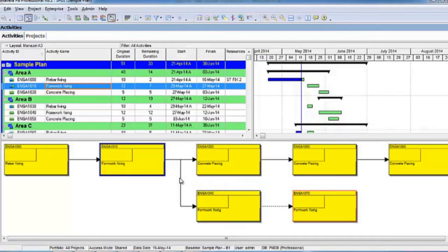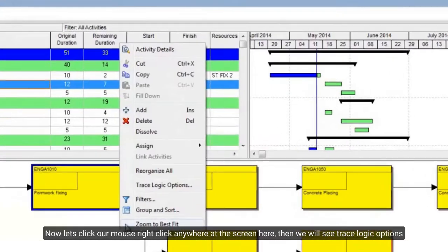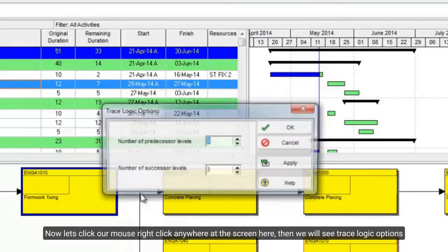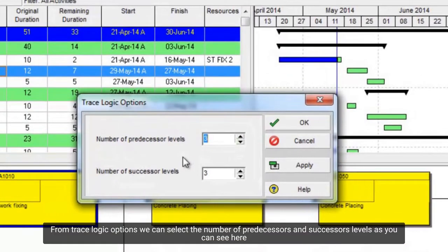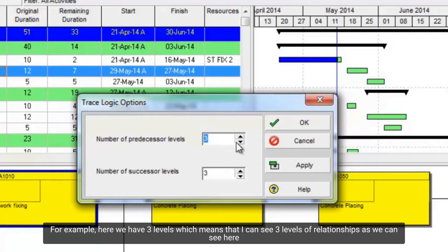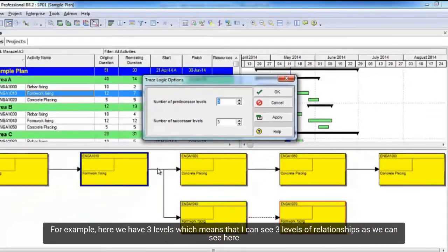Now let's right-click anywhere on the screen here, then we will see trace logic options. From trace logic options we can select the number of predecessors and successors levels as you can see here. For example, here we have three levels which means that I can see three levels of relationships as we can see here.